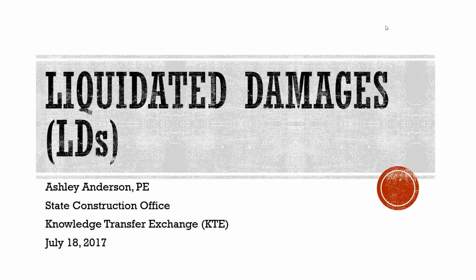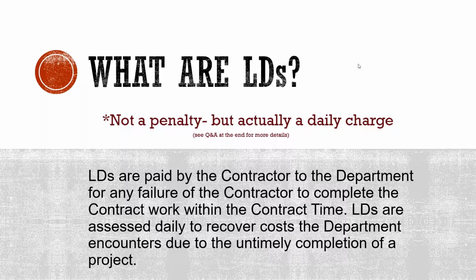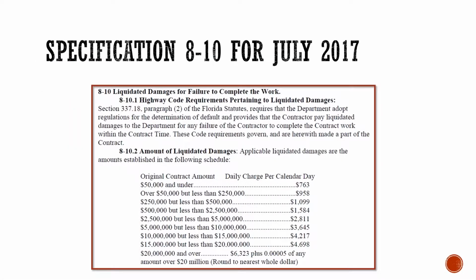This is the Liquidated Damages Knowledge Transfer Exchange. I'm Ashley Anderson. What are LDs? LDs are when the contractor does not complete the contract work within contract time. We assess a penalty for him to pay us for each day that he goes over contract time to complete the work. We have the standard specification 8-10 that incorporates the daily charge per calendar day into the contract and shows the section 337.18 paragraph 2 of the Florida statute, which is the governing document for liquidated damages.